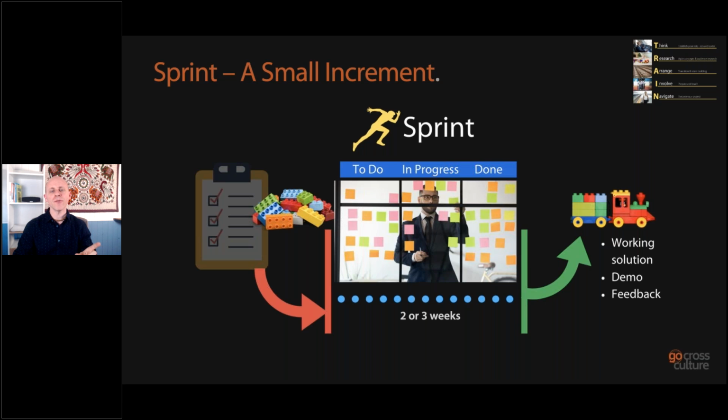It's a 2 or 3 week sprint, so it's a short duration. You think, oh, how much software could you build in 2 or 3 weeks? Well, there's other factors there, but your target is that in 2 or 3 weeks you build some software. And at the end of the sprint, you would demo that solution to your customer, and you'll get feedback from them.